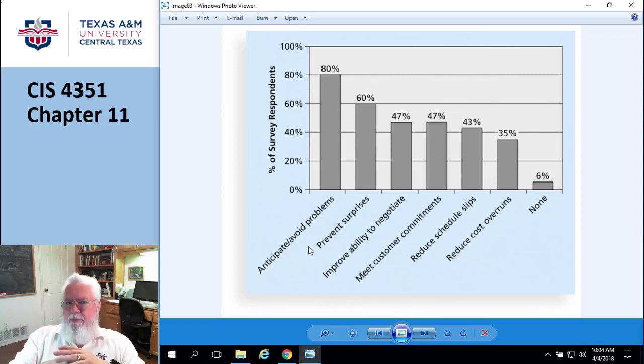So same thing here. Risk management costs money. You've got to have a staff, you've got to pay people, and whatever that cost is, a couple hundred thousand for salaries and all the rest of the incidentals, then what you're doing should have an impact greater than that, right? In other words, the swing in the pendulum has to be greater than the cost. Kind of makes sense. So just to put it succinctly, the cost should not exceed whatever the impact would be. And here they definitely are talking about negative, because it's perfectly well, maybe not. Yeah, if I spend $10,000, I can get this $5,000 contract. Okay, yeah.